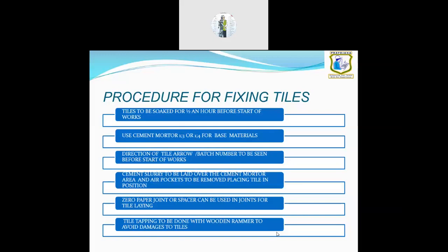It is mandatory. I will give a bit more idea why we have to keep them. Each day the tile production batch is different. Today the color coming from the same factory, tomorrow there may be a little variation because the process is like that. Even after 4 days, from the same company and same production, there may be variation due to temperature. It depends on the materials, what they contain, and the color coding. Curing happens faster or slower, and there is temperature variation in the kiln. Everything will matter. Sir, this is a must.